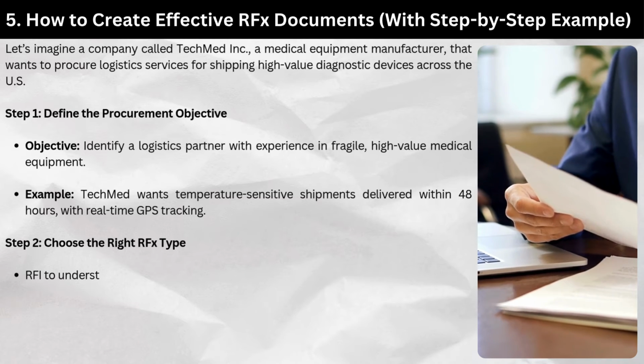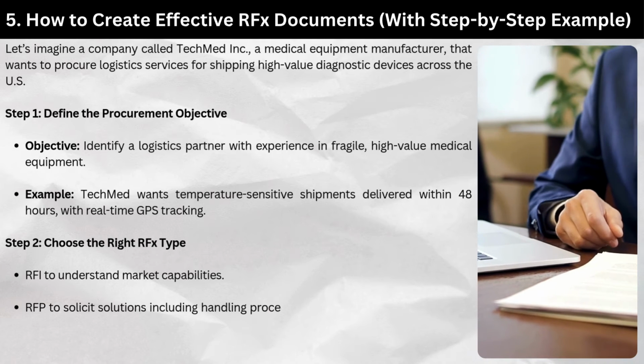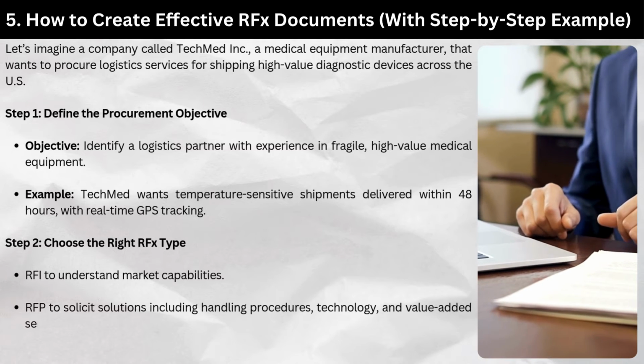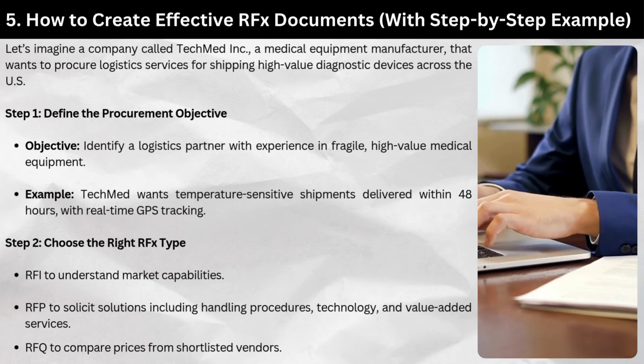Step 2, choose the right RFX type. RFI to understand market capabilities. RFP to solicit solutions, including handling procedures, technology, and value-added services. RFQ to compare prices from shortlisted vendors.